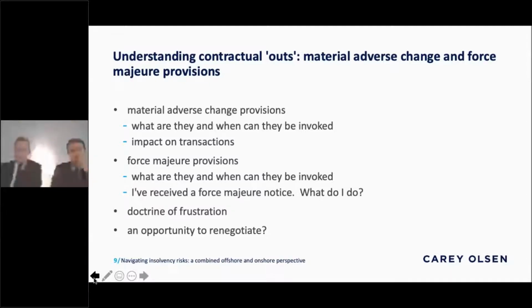Under English law, unlike French law, the concept of force majeure is not codified, and the law doesn't define exactly what is meant by force majeure, and thus the triggers, exceptions, and meaning of the concept for documents governed under English law are entirely dependent on the wording of the particular agreement.